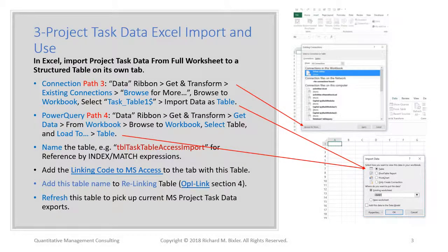You export from MS Project to update the XLS file with current roll-up MPP data. Then you refresh the table in Excel to import the XLS file data into Excel. I didn't automate this sequence so that you can work on the MPP schedule and import it when it's ready, while maintaining integrity of the logistics tables in Excel until the MPP is ready. You'll update the logistics tables in Excel far more often than you update the MPP schedule.